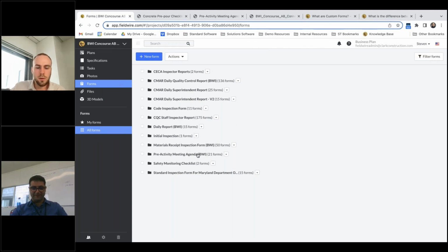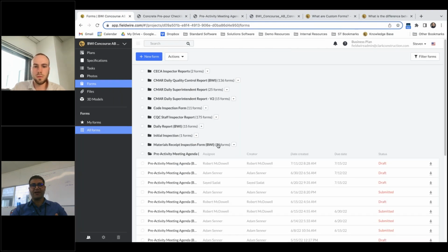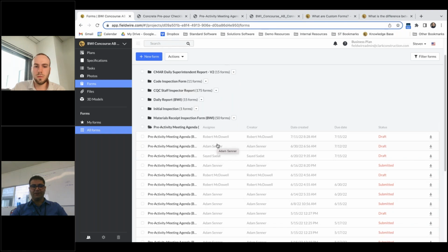Right. So from the quality standpoint, we want to make sure that every piece of paperwork that we do is in a systematic manner, starting from submitting the quality plan. After the quality plan is submitted and approved, and when the construction phase starts, we want to make sure that the submittals have been approved, and all the shop drawings that have been submitted have been approved.